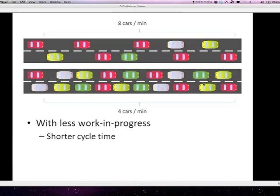So why is this important? Well, with less work in progress in our system, we get shorter cycle times. And shorter cycle times means if you have a flow-based system, that you get things from the input queue to the output faster. And this also gives you faster feedback, so if you discover a defect, and you discover the defect in the end of the process, it actually takes much shorter time to find these defects. And you have the opportunity to fix them faster.